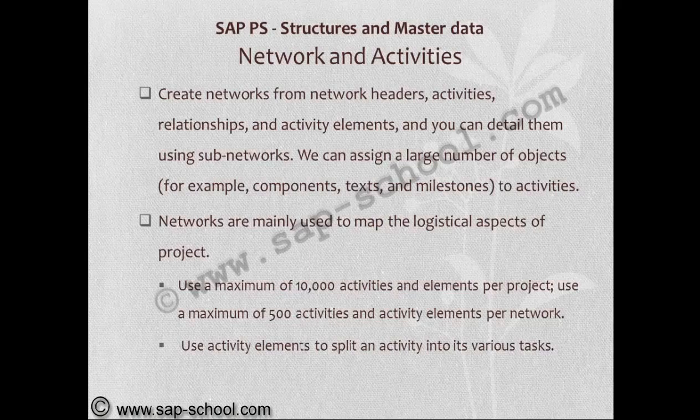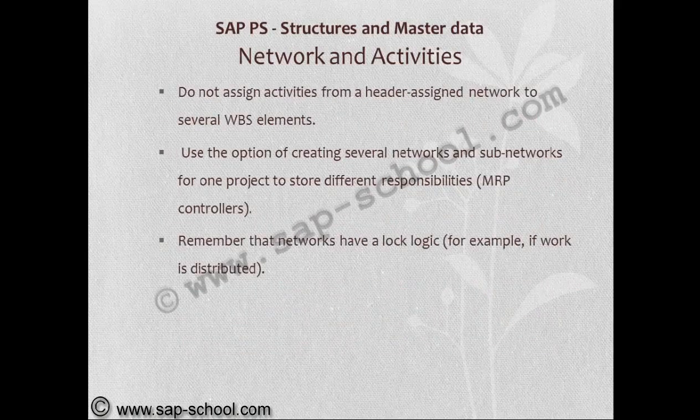Use an activity element to split an activity into its various tasks. Do not assign activities from a header assigned network to several WBS elements. Use the option of creating several networks and subnetworks for one project to store different responsibilities. Remember that networks have a lock logic. So if you follow these tips, the utilization of networks will perform better.